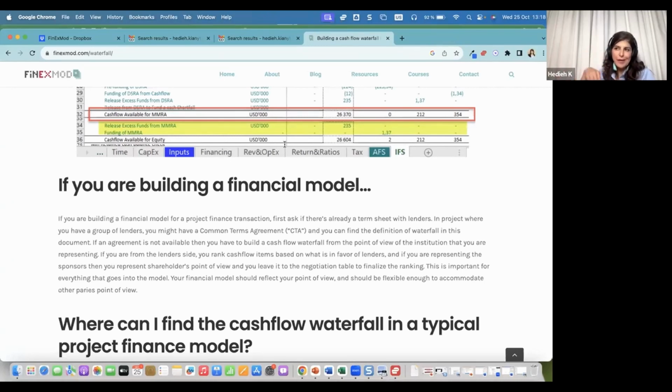In terms of the financial model, it's an in and it's an out, because you have already funded that with this reserve account. You have smoothed out this cost item, so that when you get to that year when you need to pay for that CapEx, you cancel the cost item with the release from the reserve account, you see? So that's why in terms of priority, yes, it is senior to debt service.